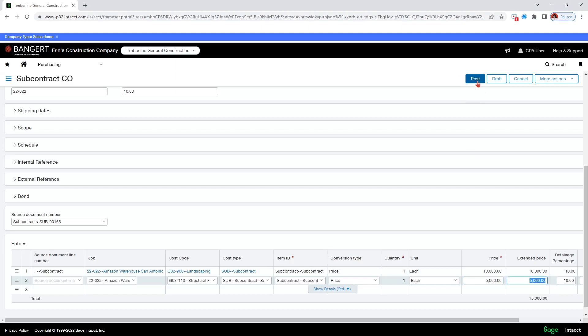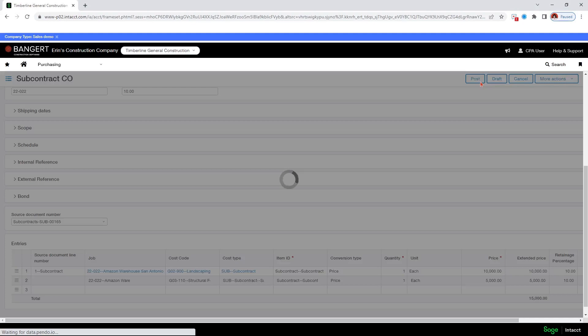And now I can post or draft. If I draft this change order, I can come back and change it later. But I won't be able to see it on the amounts. But then if I post it, I can see it on the amounts for the subcontract, but I then cannot edit it. So now I'm just going to post.